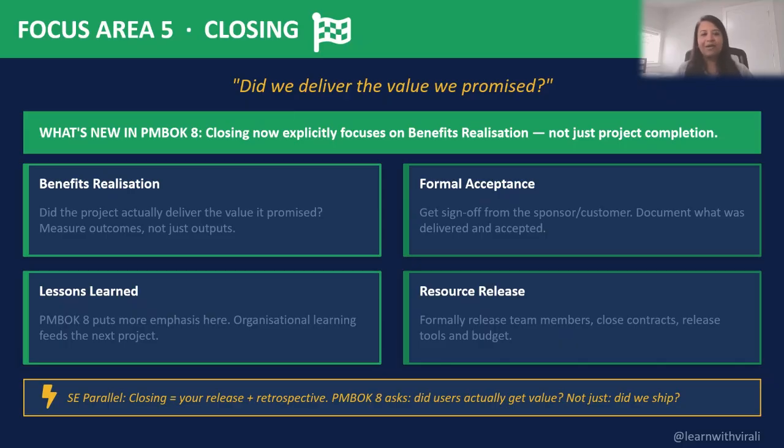Okay, all right, that's all, we are done." So in terms of formally closing the project, there are a couple of things that are now being considered. We do have formal acceptance, we do have lessons learned, we do have organizational learning that happens for the next project to follow, and then definitely releasing the resources that were associated with this project, making it a formal close to the project.